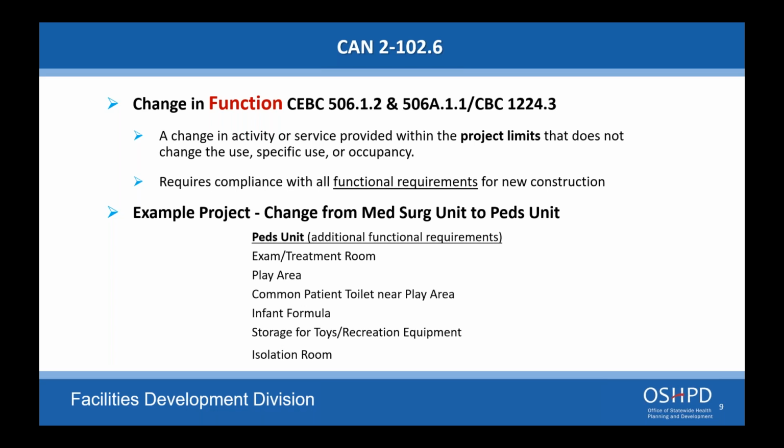So what you're going to do is you're going to have a set of documents showing your existing pediatric floor and identify all the requirements or all the rooms that are in there. And then you're going to have your Med-Surg floor, and that one you're going to identify all the requirements for the code and show us where they are located. And if any rooms are no longer needed, you're going to change them from a playroom to a waiting area or some type of other area. Just identify what those are.